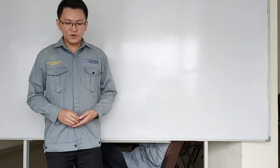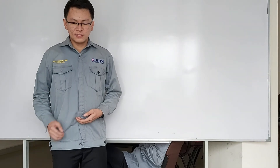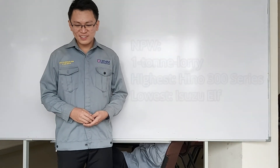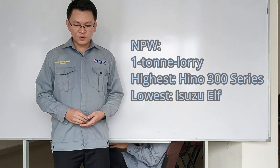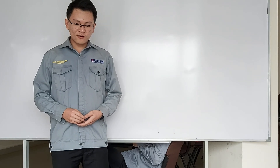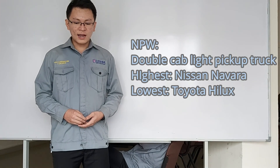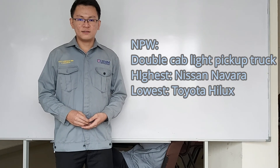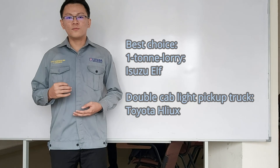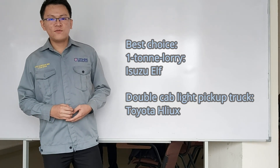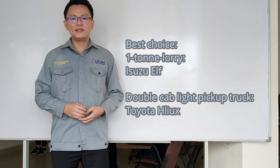For the NPW value, discrete compound interest factors are used to calculate the net present worth. Comparing the NPW values within the one-ton lorry category, the Isuzu with the lower NPW value is the suitable choice to buy for this project. For the double cab light pickup truck category, the Toyota Hilux is the recommended choice to buy in this project.